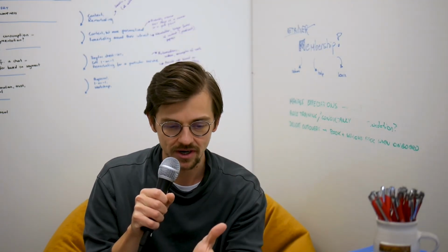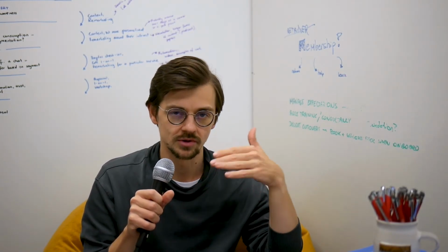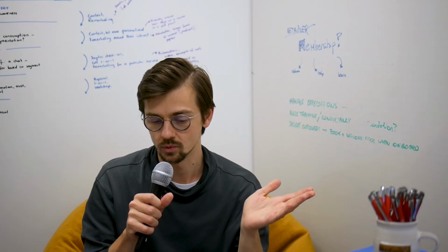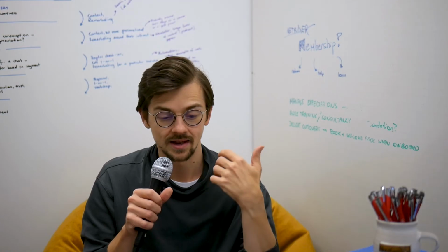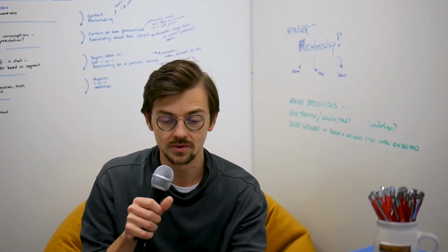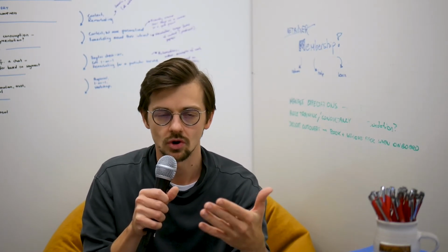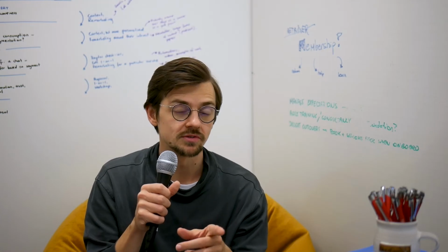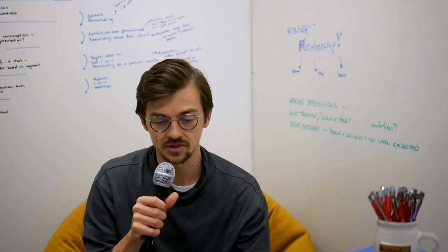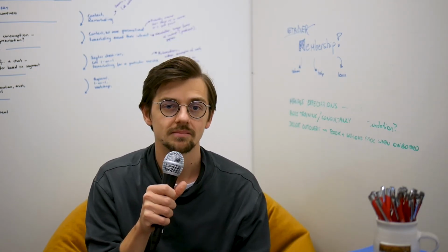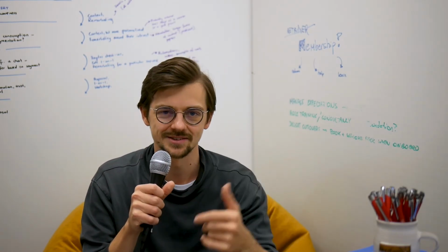At the end of every sprint, for us every week, you meet with us, we give you an update, we show you a demo of what's happening, what works, what doesn't. You get to see things in action because by now they're done. And then we plan the next sprint and we just go like that until everything is done. Right? So we just constantly talk. That's very important. But also those sprint reviews are a great opportunity for the stakeholders to join in and listen and see what's happening. So if the CEO wants to join one of the sprint reviews, let him, by all means. And if he has a question, there you go. That's the right place to get answers to their questions.